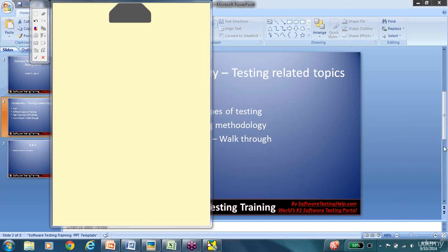What if the client realizes that he wants to make changes in the BRD at the time of the define phase? Then how does it work? Then you'll have to go back to the initiate phase, rescope it, get your requirements back, and start again. In fact, if it happens in the define phase, it's even better because you haven't proceeded further. But imagine the client realizes they need to make a few more changes in scope once the project reaches the code phase, in which case you'll have to go back and restart all of it. That lack of flexibility is a major issue in the waterfall model.